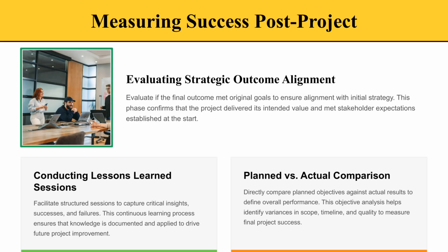Measuring success after project completion means evaluating whether outcomes match the original goals and what value was delivered. Conduct lessons learned sessions, compare planned versus actual results to identify variances, and use these insights to improve future planning, execution, and objective setting practices.